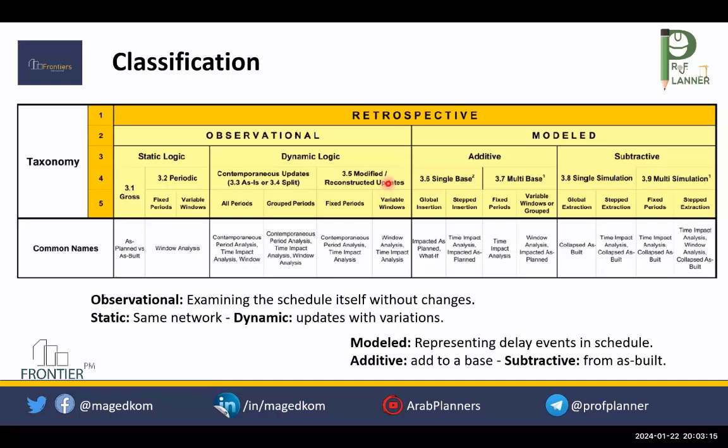But when reconstructing, we have to identify when phase 1 was delayed and whether the employer provided the design for phase 2 28 days prior to that. If phase 1 delay is contractor responsible, then the employer has time, 28 days prior to the date on which the contractor completed phase 1.